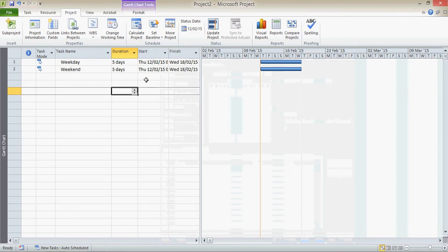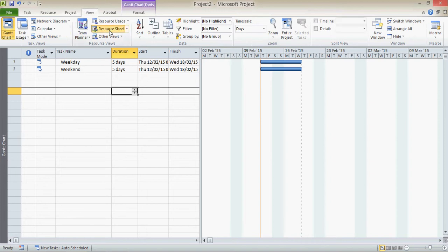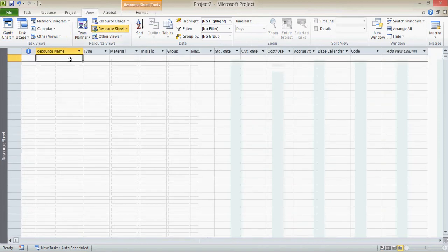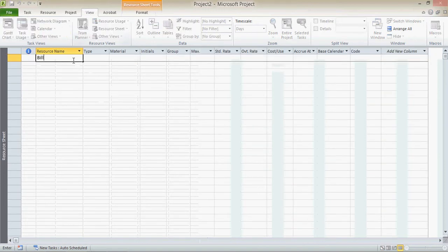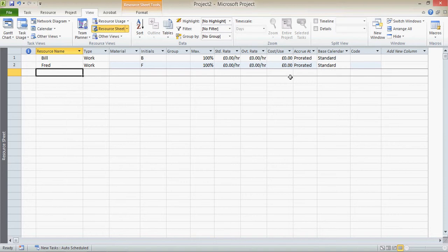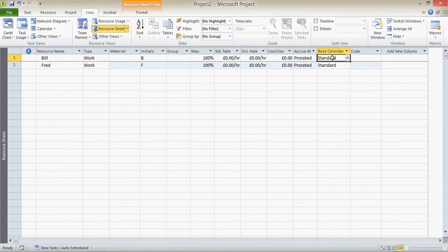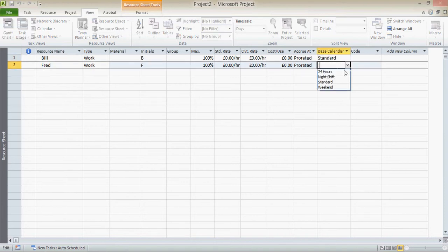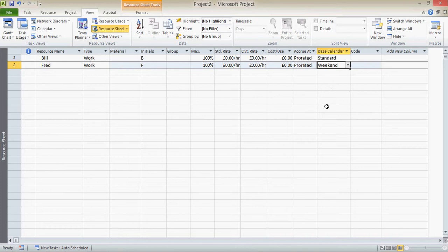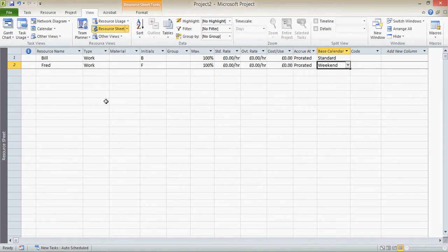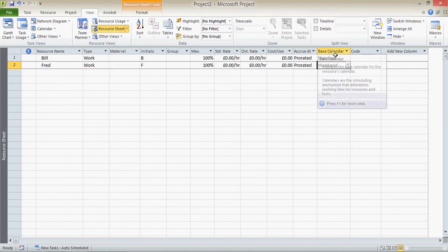Not had any impact on here yet, because no resources are actually working on those tasks. So we now go into the resource sheet. Bill and Fred. Bill works the standard calendar. Fred works at weekends. Now these are base calendars for these resources. They're not the individual resources calendar. It's just the calendar that their individual calendar is based upon. And that's why it actually says base calendar here rather than just calendar.